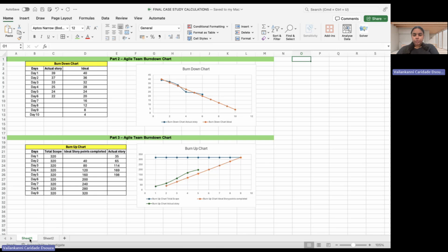So, how are we doing overall? The team is slightly below the ideal velocity of 4 points a day, but still on track. If they continue at their current average of 4.17 points a day, they can complete the sprint on time. However, there is a risk of burnout if this pace isn't sustainable.